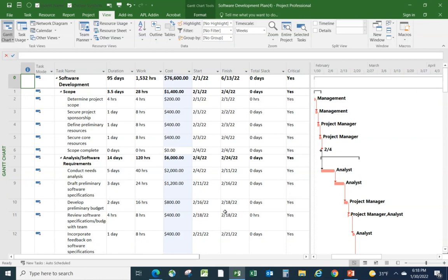But once the project starts, of course, some things might take longer, some things might take less, and you might have to change the plan going forward for all sorts of reasons. And you start to drift away from the currently approved dates, maybe for the worse, maybe for the better. And maybe some tasks will be for the better and some will be for the worse. But either way, it's always going to be helpful to know what the baseline approved dates were, so that when we track progress, and we'll see in a subsequent video how we actually go about tracking progress, looking for variances and making adjustments, we know what the original plan was. So let's set a baseline.